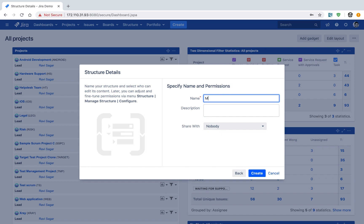In the Structure app, you have the option to create two types of structure boards. The first type is called Automation and the second is called Manual. When you create a board with Automation, your board will auto-update itself with new issues. For example, if you create a board for three or four projects and a new epic or issue is added to your project, the same will be reflected in your automation board. In manual boards, the issues you define will stay as they are and will not auto-update. Let us first create an automation type of board and give it a name.